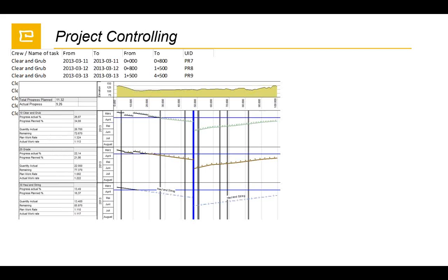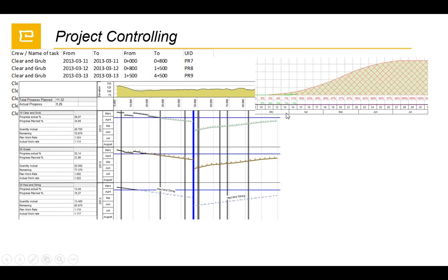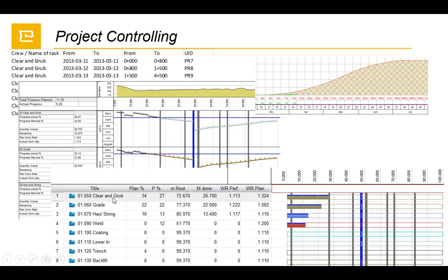And from here, we can reach the S-curves. We can get S-curves based on time and the actual progress. This red one is the planned progress, and the green one is the actual progress. This can be based on duration, and also based on cost and resources. The most interesting part in this case is that it can be based on duration, which you work around in other systems to get. And the most interesting and exciting part is to get the report, distance Gantt chart. And this data which was in Excel for progress, now all these reports come from these values.